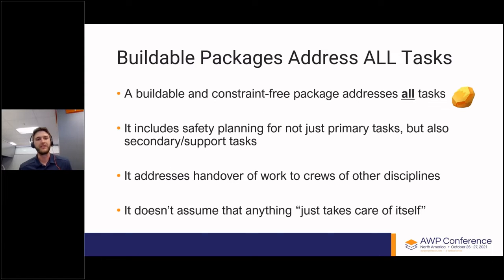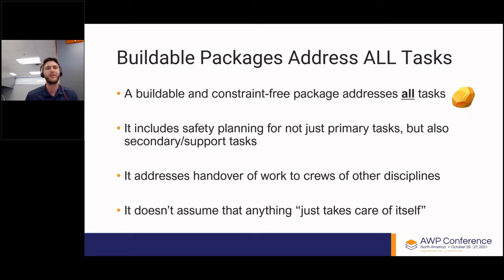So, this is kind of the key that I want to drive home in my little portion of the presentation here, is that a buildable and constraint-free package addresses all tasks. It includes safety planning, not just for your primary tasks, but also secondary and support tasks. And it addresses handover of work to crews of other disciplines. And it doesn't assume that anything just takes care of itself. So I'm going to pass this over to Ben Swan, and he'll discuss principles of building installation work packages.